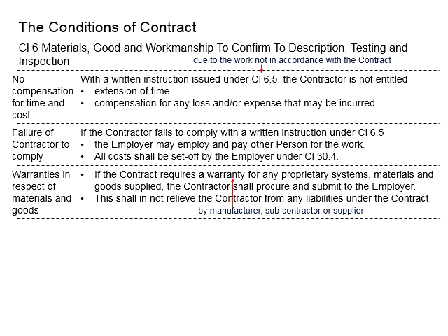However, the nature of the project as executed by the contractor involves installations and setting out of the relevant materials incorporated together with the building. Normally, this warranty as provided by the manufacturers involves the system alone. It doesn't go beyond the system or the material which is being supplied, and therefore the contractor will have to be liable for the functionality and efficiency of the entire system as incorporated together with the building. As a result, even though the contractor has submitted the warranties handed over to the employer, it doesn't relieve the contractor from any liability under the contract.